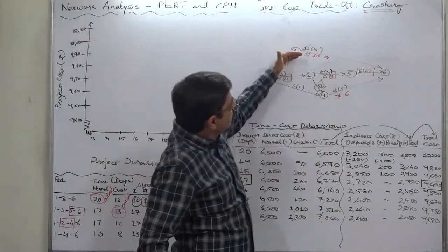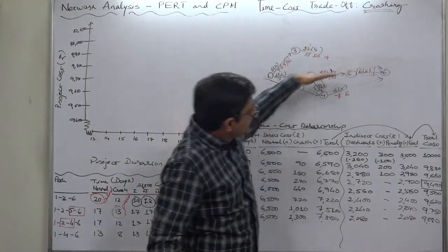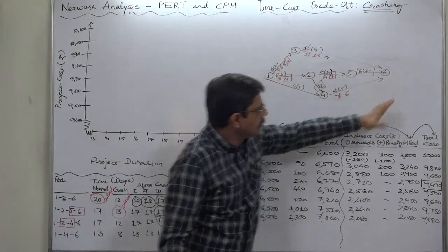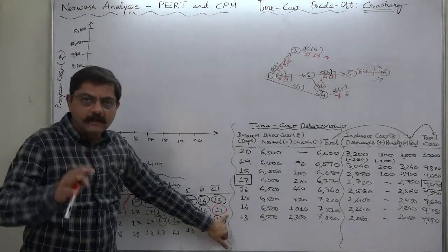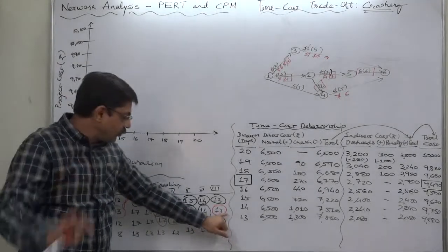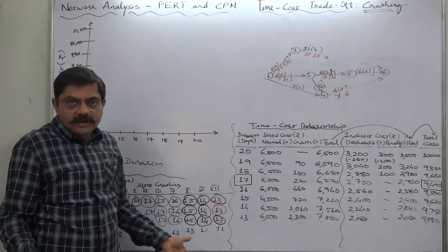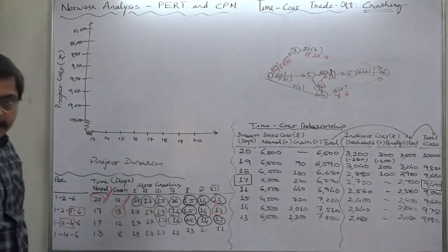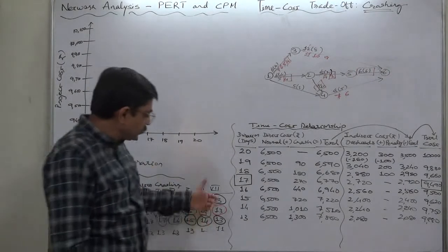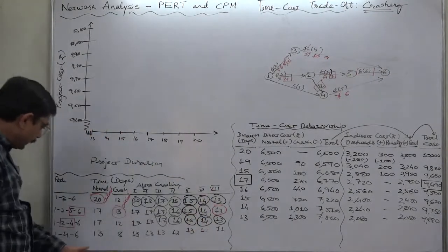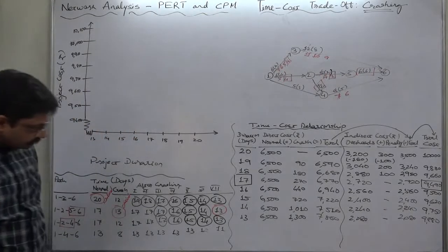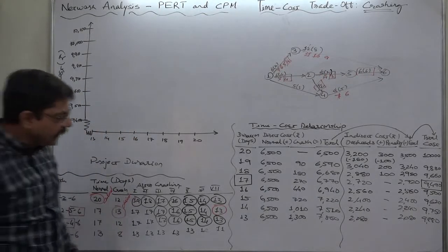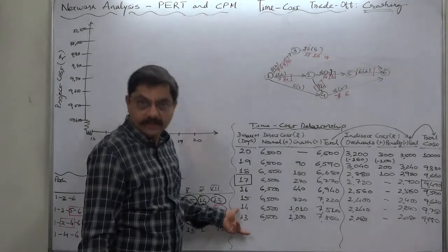So even if we crash these two critical paths the duration cannot be, rather critical path duration cannot be less than 13 days in any further trial. So we should stop crashing after this 7th trial and that's why we can say that this project cannot be completed in a duration less than 13 days.